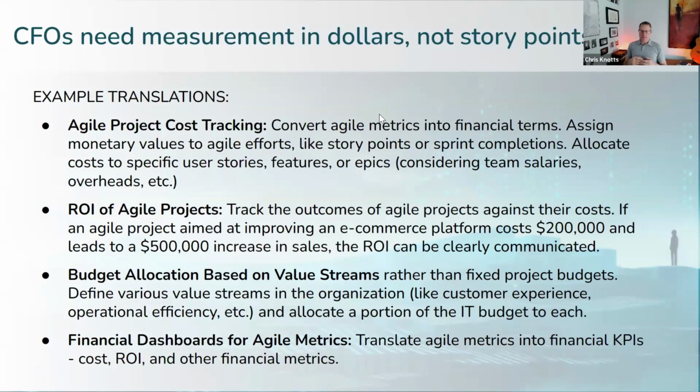So the first issue is that, annoyingly, a lot of times at a team level or a Scrum level, we start measuring value in things that are really useful for running work in an agile way at a team level, like story points or sizing or a burn down or whatever. Well, that's great for helping the team get their work done in a more efficient, better prioritized way. But it stops short of actually translating the value of that output into terms that the people who are making financial decisions about what type of work to invest in, what in our portfolio to prioritize, need. Those types of agile metrics don't give those folks the information they need to effectively manage the portfolio at portfolio scale. So at team scale, this stuff is good, but it's not a solution at portfolio scale.